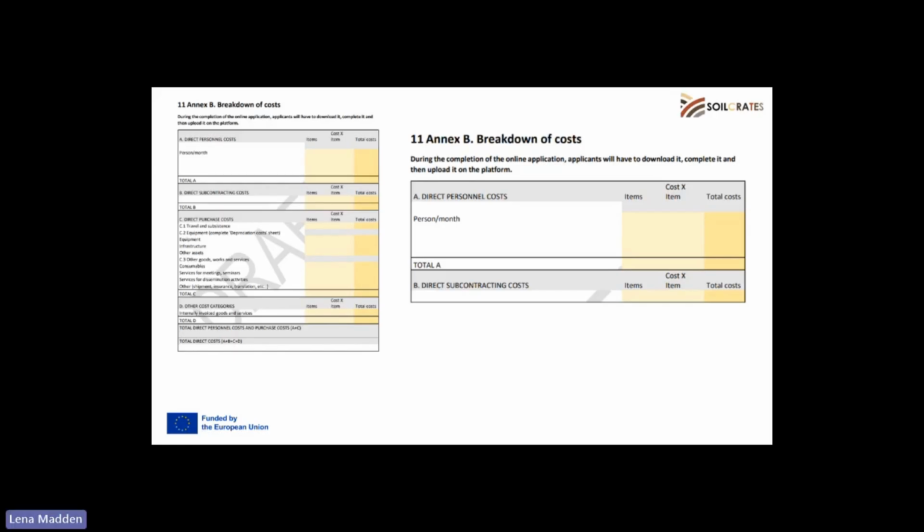Basically, you group your hours per day in the month, and that is your person-months. We'll explain at each session that we're going to be holding in September. It's a direct contracting cost. It's not only the hours that you spent conducting the practice. You would need to include hours that you would spend, for instance, when you're granted, preparing the project and doing some research on the topic.